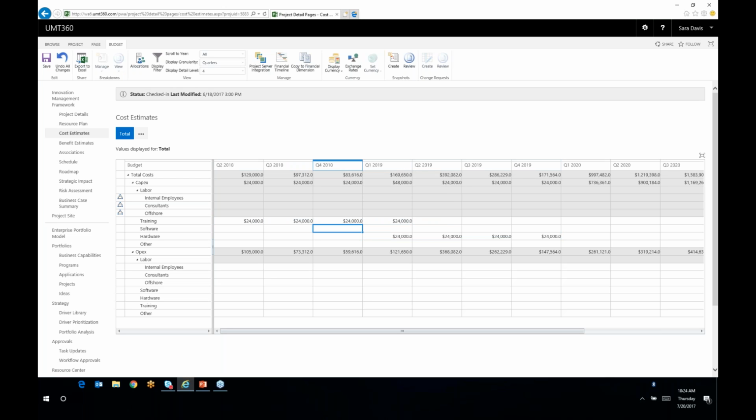Now, I can operate completely top-down, independent of the schedule, or I could be fully integrated with the Microsoft PPM schedule, and that can change stage by stage as you progress through the workflow. I can also operate in a hybrid mode, where certain nodes in this cost structure, like internal labor, consultants, offshore, can be pulled from the resource assignments in Project, and other nodes like software and hardware can remain freehand. So there's lots of flexibility as you progress through the life of the project.